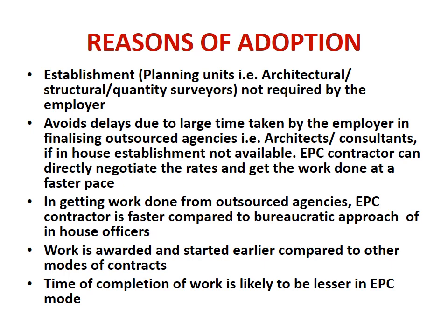Then another advantage is that work is awarded and started earlier compared to other modes of contract, like item rate contract or percentage rate contract. In an item rate contract the work cannot be awarded at a faster rate, because first all the drawings will be prepared, then checked, then somebody will approve them, and only then will a bill of quantities or detailed estimate be prepared, then the tender document, and ultimately the work will be awarded.